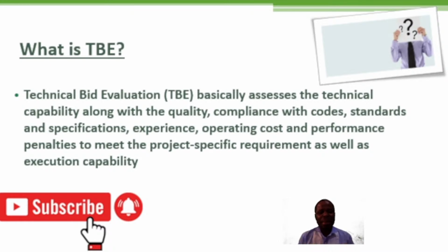So what is technical bid evaluation? Basically, in technical bid evaluation, we assess the technical capability. Don't forget, technical capability along with quality, along with compliance with codes, because various equipment we have in the oil and gas industry, even manufacturing industries, their basic designs are governed by one code or the other, one standard or the other.